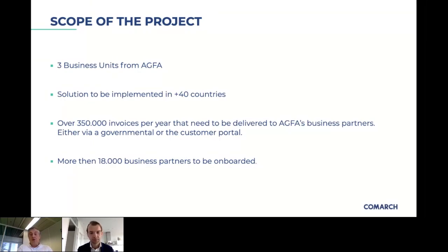We focus on a 3-month window, and we try to work country by country and not try to do everything at once, because that is definitely not helping. Now, one of the biggest lessons learned is on the onboarding, like you mentioned, Nick.